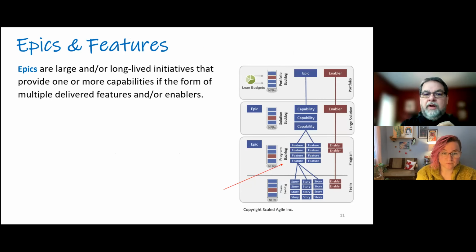So a little bit more on epics. Epics can be a few months, a few quarters, actually a few years. And epics can report to super epics, so you can keep the work breakdown going. The bigger that something is, and the more multi-year it is, usually you have to simplify what it is you're talking about. And you get more detail as you break down the components. So you may have year 1, year 2, year 3, but what's in year 1? What's in year 2? What's in year 3?